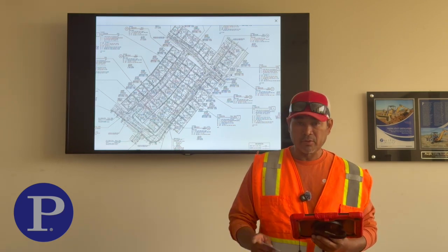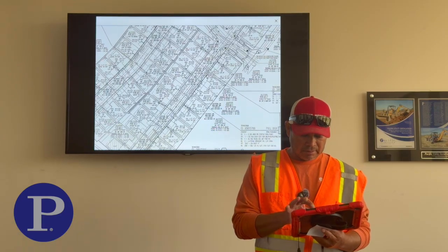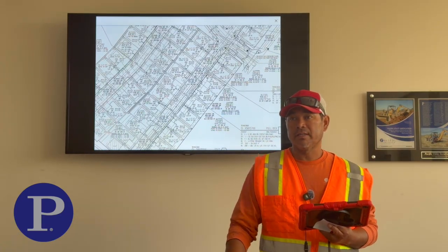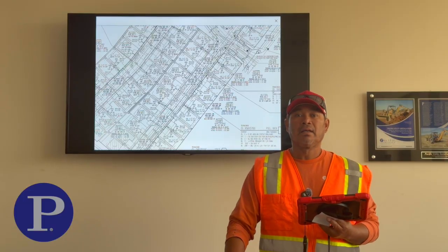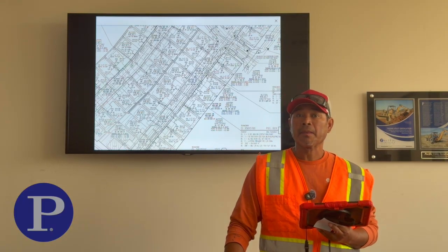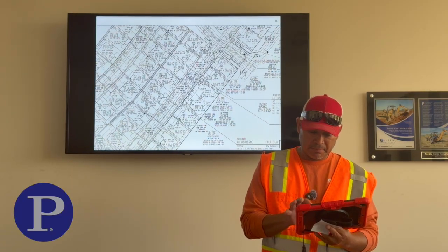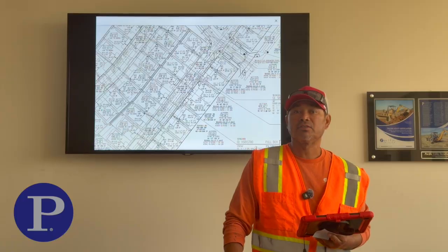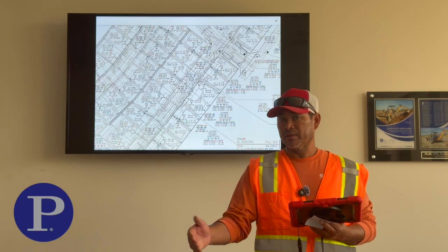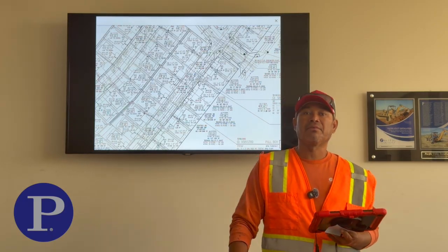Also in this work order, I'd say about 22s, which is another 65 feet of pipe. And just being generous, you're going to use about 15 45s. That's adding another 45, 50 feet of pipe.